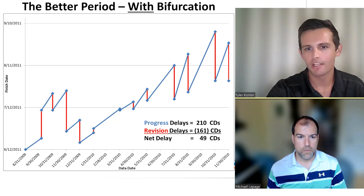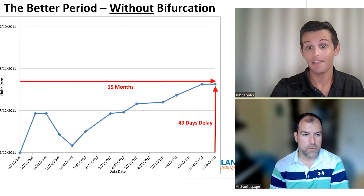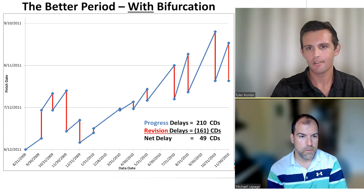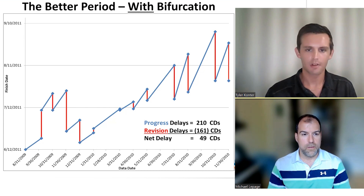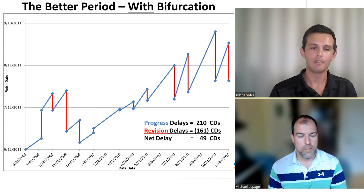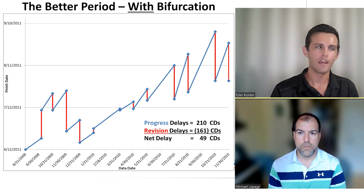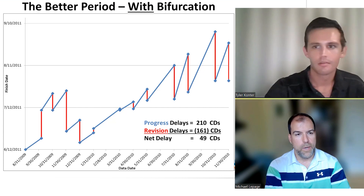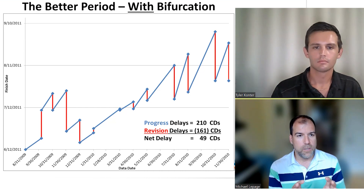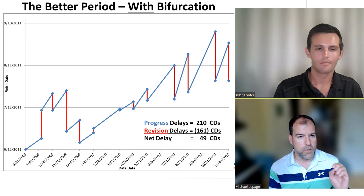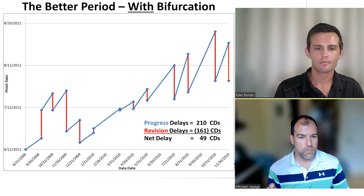Keep in mind, the graph you were looking at is still our better period. What you're seeing here — the 49 net days of delay over 15 months — and what you're seeing here are the exact same time period. The difference is that we've gone ahead and split up, or bifurcated, the progress delays from the schedule revisions. By doing this, we get a better grasp of how much progress was lost during a period and who that progress delay could potentially be allocated to. As a forensic analyst, you're able to pull those two updates apart — the finished date of the progress schedule shown in blue and the revision shown in red.